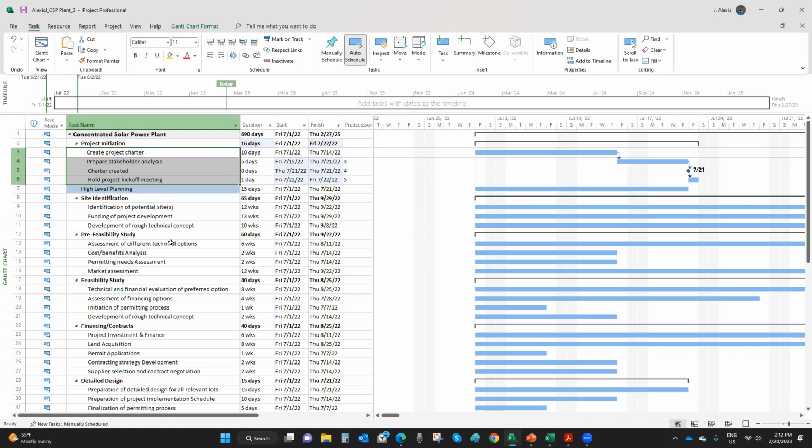The second reason is because you don't have enough resources. Because to work on two things at the same time, because people can't really multitask, you'd need someone else to work on the other tasks, right? So if you have Peter and Daisy working for you in this project, you can say, Peter, you work on this, and Daisy, you work on that. And based on the availability, how many hours the task will require in any given day, then they can put their hours and effort on those tasks, and you can go faster.